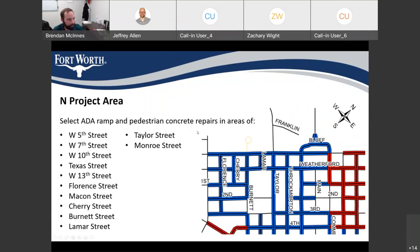For the concrete rehabilitation area on the north side of the project, we'll be doing select ADA ramps and pedestrian concrete repairs in the areas of West 5th Street, West 7th Street, West 10th Street, Texas Street, West 13th Street, Florence Street, Macoon Street, Cherry Street, Brunette Street, Lamar Street, Taylor Street, and Monroe Street.